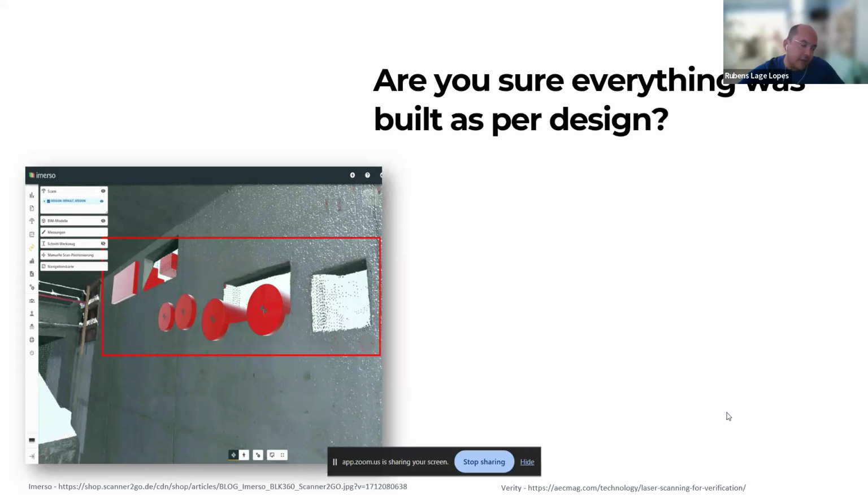It might be that when that wall was built, the design was, let's say, version 3. I already experienced that in a project. There was version 3, and then 2-3 months later the design team said, no, we need more openings, and we need to move that opening down. But the wall was already built, and the design team did not know that the wall was already being cast. It's a precast wall, so it's in the file. And then, yeah, there you go. They changed the model. Happy days, keep going.